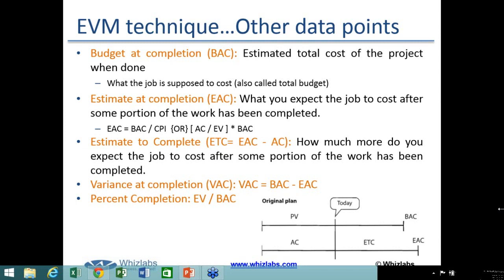That means in order to complete 50% of the work, you spent $8,000, and now you are left with only $2,000, and within that $2,000, you need to complete 50% of the work, which is a fairly difficult task. And now the situation is you need to speak to the customer and get more money.